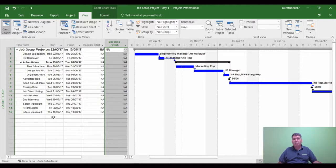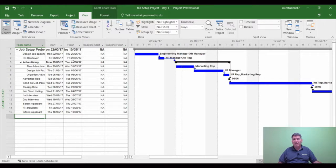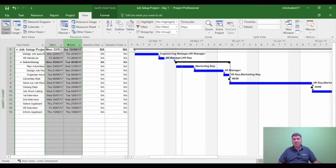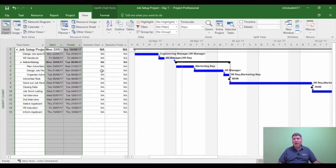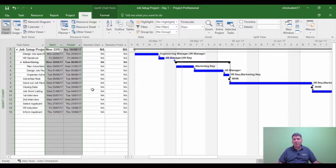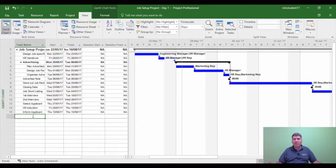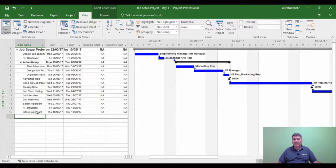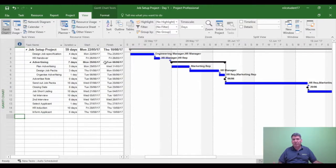So what dates would we expect to go into the baseline start and baseline finish? Well, all that's going to happen is we're agreeing to the start dates, we're agreeing to the finish dates. They're just going to copy themselves across to the baseline start and baseline finish. That's all that's going to happen here. All the costs in the cost table, that's also what we're agreeing to. So everything now we're about to agree to, when we set the baseline, everything is ready for any changes to the project. So I'm just going to change tables again just to get used to changing tables. Back to my entry. Now entry is the default table.